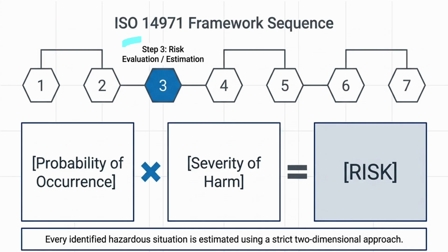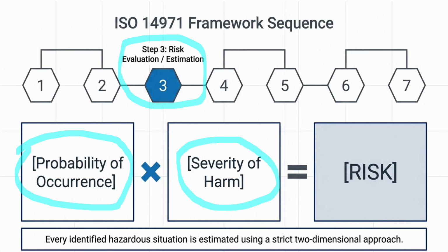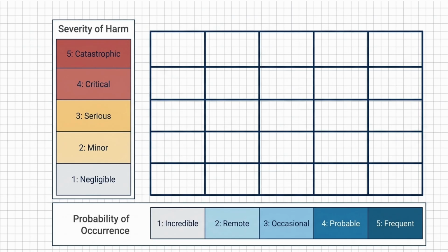After you identified the potential risks or failure modes, the next step is to evaluate the risks. And risk is defined as the probability of occurrence and the severity of the risk if it occurs. Why? Because it is not enough to identify a hazard. You must determine how likely it is to happen and how bad the outcome will be so you can have proper mitigation. This process, the risk estimation process, converts the risks into a quantifiable assessment using this scale.